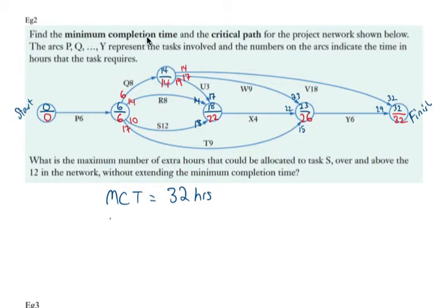Next step is to find the critical path, highlight all numbers that match earliest start time and latest start time. Highlight that path. List out the path.